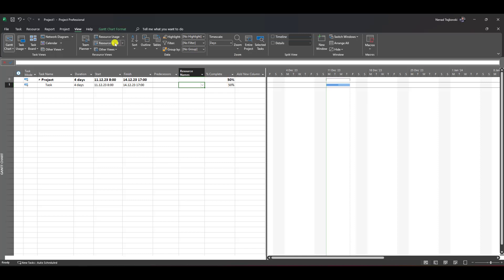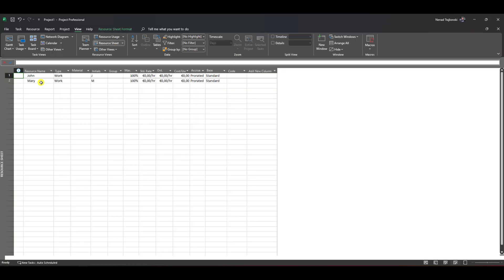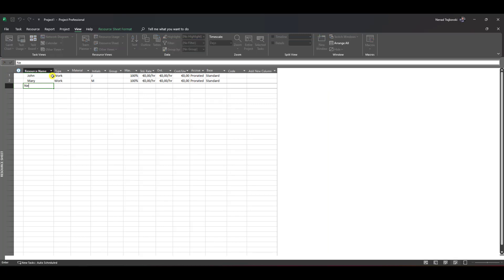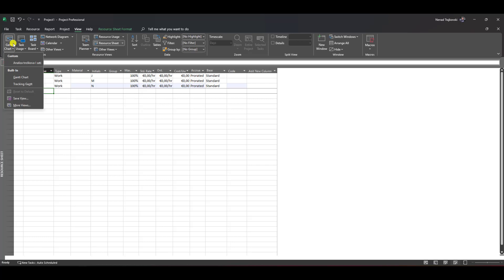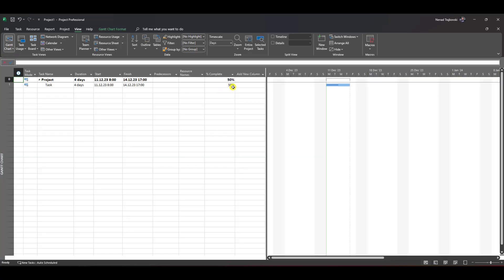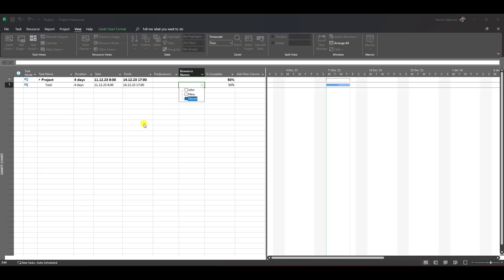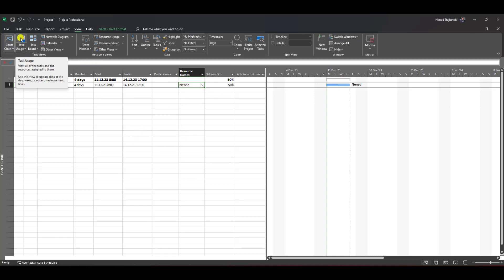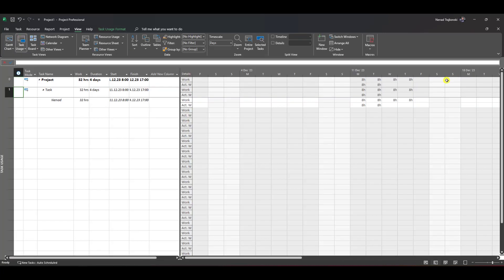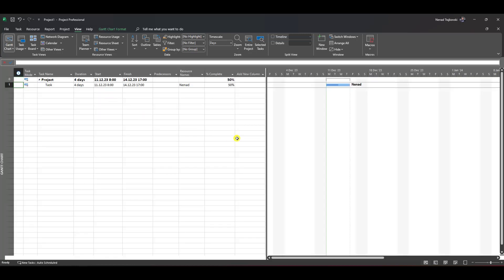Now let's say I want to add myself to this task. I'll assign myself here in the Gantt chart. If I go to Task Usage, you'll see it shows that I did 50% of the work. This is something you should be aware of when you erase resources.